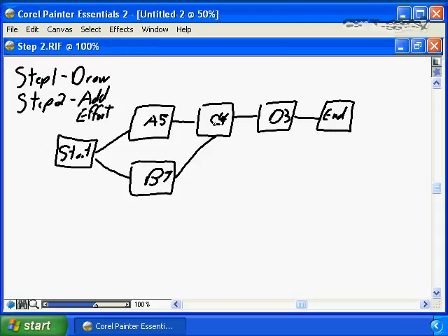At this point, it doesn't matter which resource is going to work on it. It can be resource number 1 because they're available from A. It could be resource number 2 because they're available from B. Or it could be yet a different resource based on the skill requirements for the project. But again, based on 100% availability, 100% utilization, it will take 4 days worth of effort on the project to complete C, and the same applies to D, which is 3.